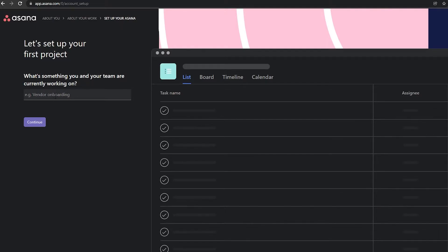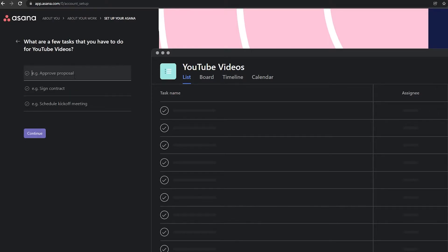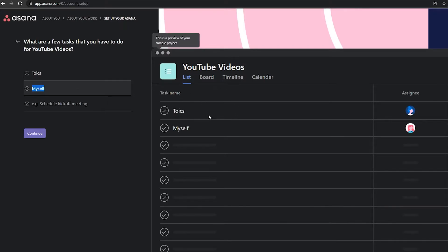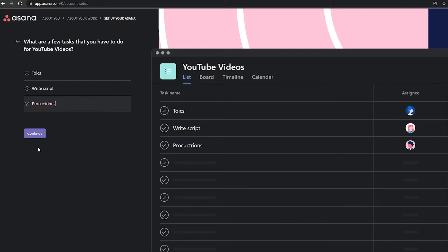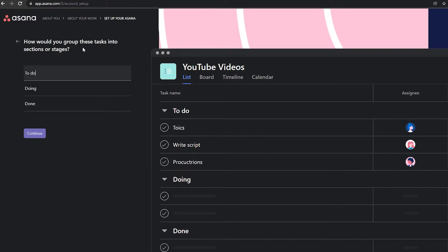We're working on YouTube videos, so I'll click continue. For the tasks involved, first we come up with topic ideas, then we write a script, and then we go into production. I'll add those as task names and click continue.